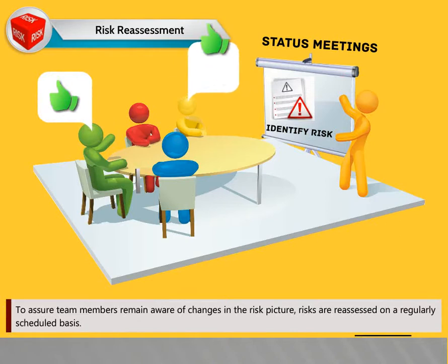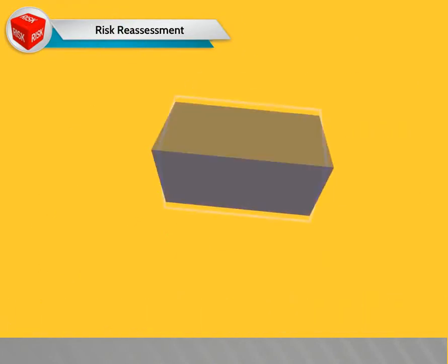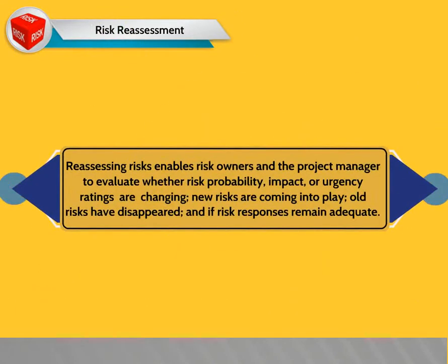To assure team members remain aware of changes in the risk picture, risks are reassessed on a regularly scheduled basis. Reassessing risks enables risk owners and the project manager to evaluate whether risk probability, impact, or urgency ratings are changing, new risks are coming into play, old risks have disappeared, and if risk responses remain adequate.